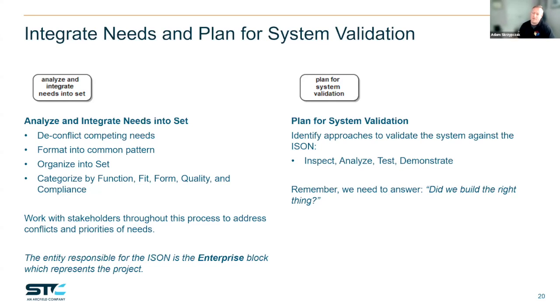And as you're working through this process, it's not done in a vacuum. You're going to always be touching base with your different stakeholders to ensure that you're capturing things accurately. You're going to basically say, hey, we thought this stakeholder and this stakeholder had a very similar need, but this is what we refined it as. Doing that early and often will make your later reviews a little bit easier because by that point, you should just be gaining agreement, not trying to fix the entire integrated set of needs. So keeping it recursive and keeping that line of communication back is important.